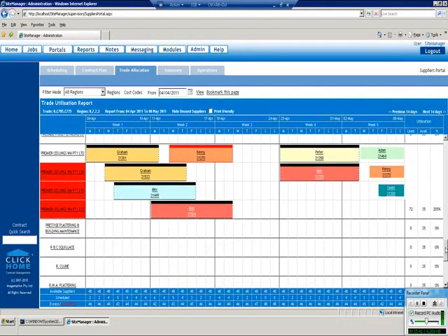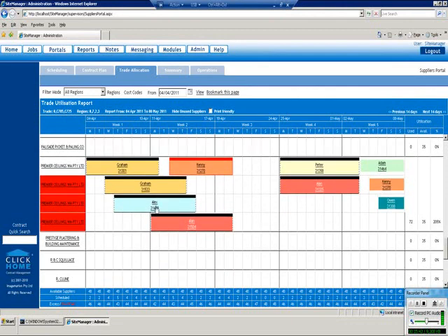One important thing to note, probably this is the best one to see, is where you've got a black surround, it means that task has been planned, and there are differences on the lines here. Where it's a red surround like that, it means it's forecast. It's due to be done, but it's not done yet. That makes sense. And then these ones over here spread across the boundary. So if I went to the next 14 days, you see their surrounds.